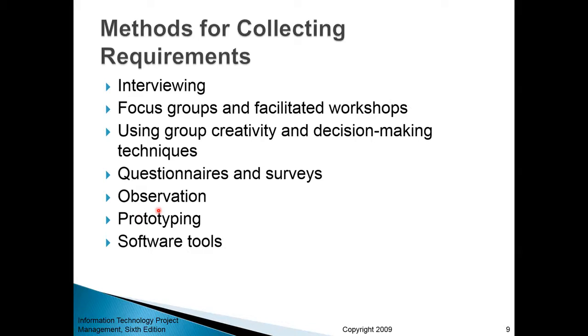Prototyping. Prototyping means creating a small beta version or a small draft of a particular document and presenting that prototype to your end users. This is done to stimulate their thinking and creativity, because not everybody is creative, and not everybody can come up with a list of requirements just using his or her imagination from scratch. Most people want to see something tangible before they have any ideas, right?